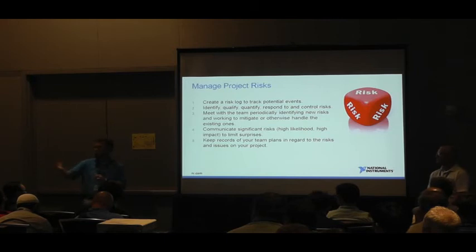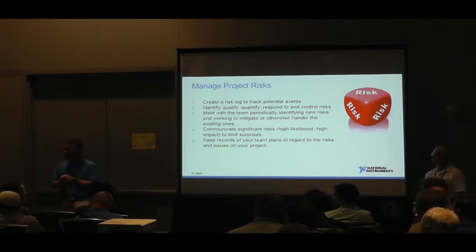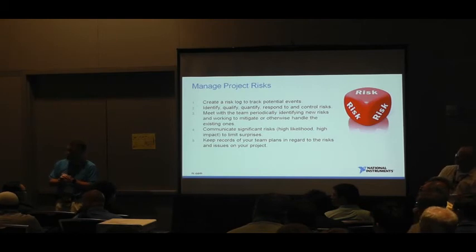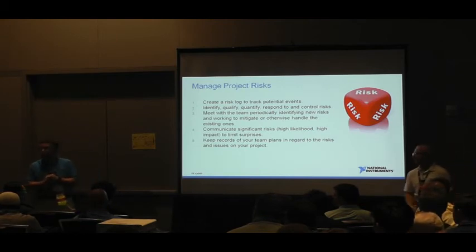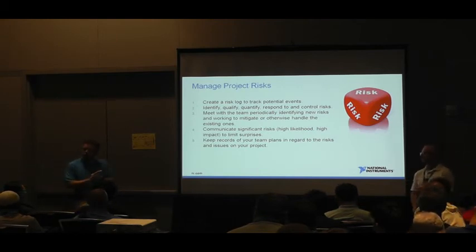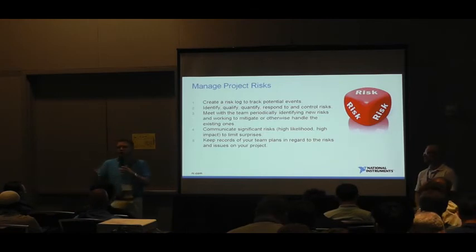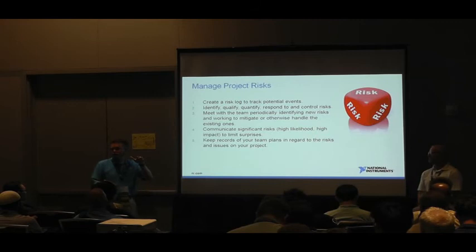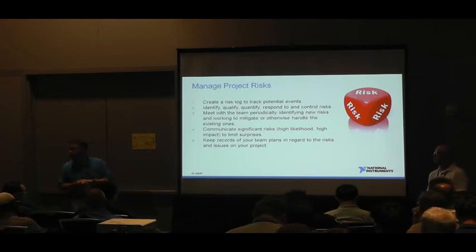Yeah, I think in some projects there is something called contingency money. That's a good idea also in software projects. Just add some amount for unknowns. Right. So his point was maybe you add a contingency buffer to your estimate. Is that not common in the software industry or not?